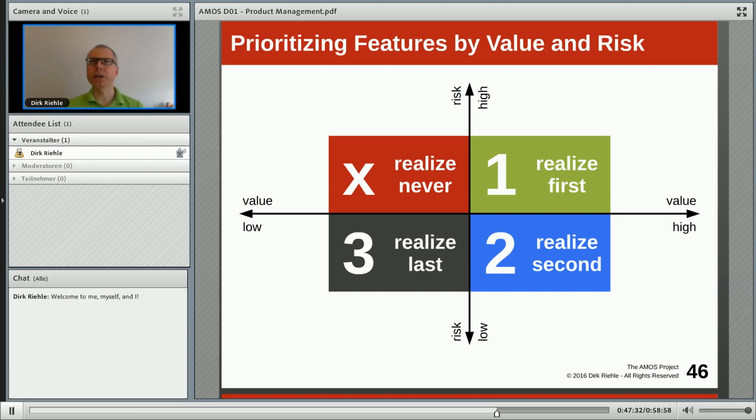There are many different ways of looking at prioritization, many different models. Usually you do have a good intuition. Sometimes, in addition to these, there are completely independent features and I need to see what's the higher business value. There will be other topics. So let me take a look at the very basic value and risk model here. You should put highest into your product backlog the most highly prioritized items, those of high business value. That seems obvious, but also of highest risk.